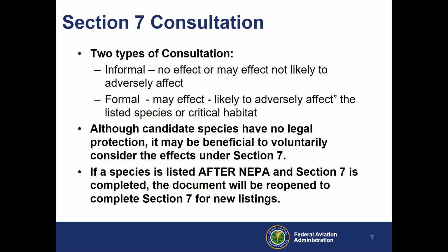Also important to note is that we do have candidate species and they do not have legal protection, but it is a benefit to us if we consider those effects under Section 7 to candidate species, because oftentimes after we complete NEPA, Section 7, a candidate species may become listed and the project hadn't been constructed yet. Well, we have to go back into NEPA and open up Section 7 and consult on that species that was a candidate that is now listed.